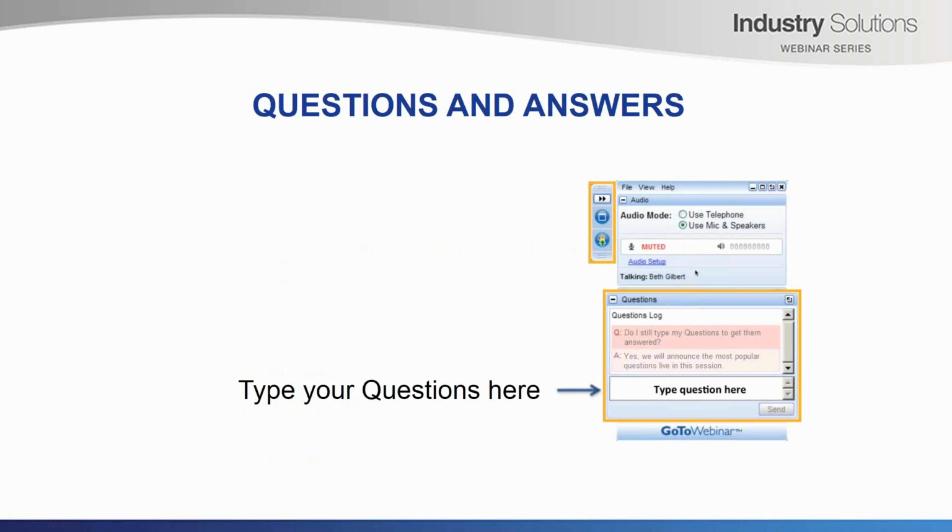Yes, you can. We can assign the task to a role, a team role, for example, say surveyor. And you can define two persons as surveyors in the team role. So when the task is assigned, say, to the surveyor, both persons designated as surveyors, they will be assigned the task.